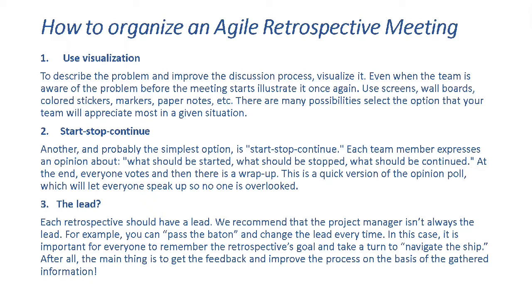Next. Number two is start, stop, and continue. Another and probably the simplest option is start, stop, continue. Each team member expresses an opinion about what should be started, what should be stopped, what should be continued. At the end, everyone votes and then there is a wrap-up. This is a quick version of the opinion poll, which will let everyone speak up so no one is overlooked.